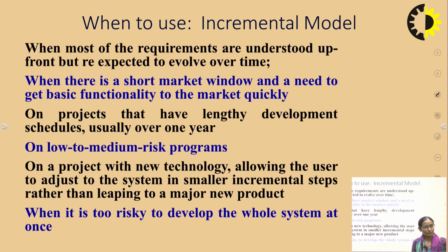On a project with new technology, it allows the user to adjust to the system in smaller incremental steps rather than leaping to a major new product. And when it is too risky to develop the whole system at once, it is best to develop in increments.